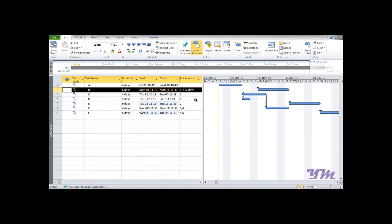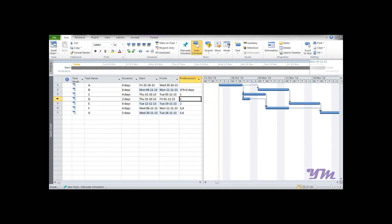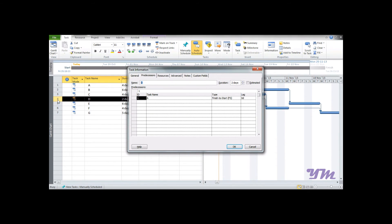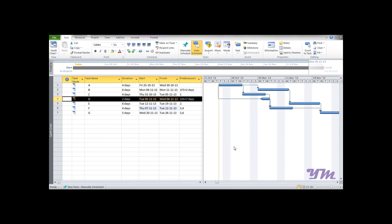Now suppose Activity D has a Start-to-Start relationship with a lag of seven days with respect to Activity A. Currently, Activity D starts just after Activity A is completed. To change this, double-click the predecessor number for Activity D to open the dialog, select Start-to-Start, adjust the lag to seven days, and click OK. You can see Activity D now begins seven days after Activity A begins.